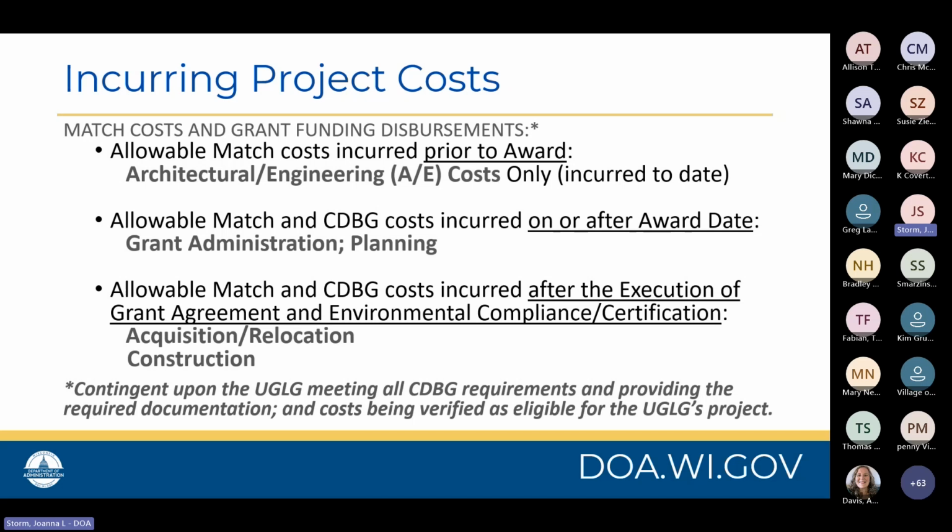Please note that you cannot incur any acquisition, relocation, or construction costs until your environmental compliance or certification is completed, which I believe is true for all of our 2024 PF projects at this time, and you have a grant agreement or contract executed with DOA. If any of you are in other places, depending on the CDBG program dollars you're working with, just note that you want to hold off on incurring those hard costs until you do for sure have the DOA grant agreement executed and all of your environmental work is completed.